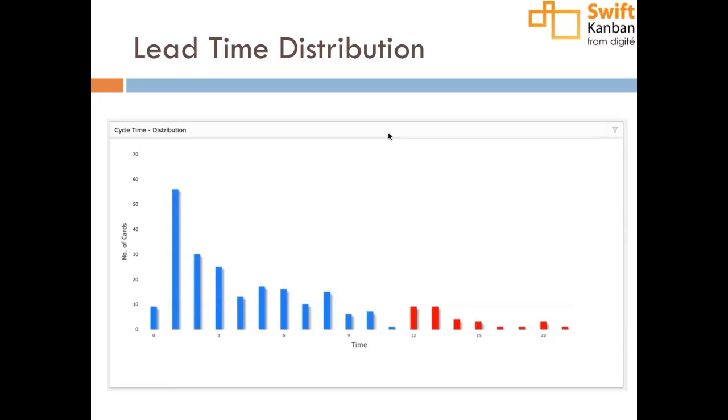For those who have played the No Estimate game, right? It's clear that card sizing and lead time are not very tightly coupled. So if you're within an order of magnitude, you're all right. The thing that is important is how uniform and granular the cards are, right?